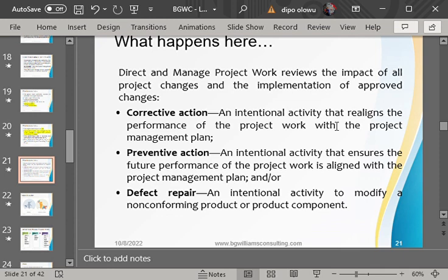Preventive action, he can say, I don't want that error, that guy almost made the project fail. Let me change him. Let me bring another person that can quickly do that work for me. I don't want anybody that will be sluggish in this particular project because of time. You are seeing that what he has done is a preventive action, because he perceived from previous experience that that person could have caused a problem, and he doesn't want that scenario to occur in this current project. So he did a preventive action by trying to remove that person.